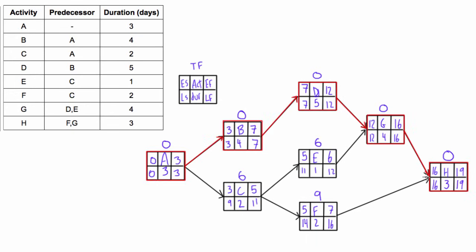Now the last thing to do is find the free float of each activity, and we'll write the free float beneath each node. The free float is the minimum early start of all successors of a given activity, minus the early start of the given activity, minus the given activity's duration. Also note that free float is always equal to or less than the total float — it can never be more. So right away, if you're on the critical path, you know the free float will definitely be 0 for all of those activities.